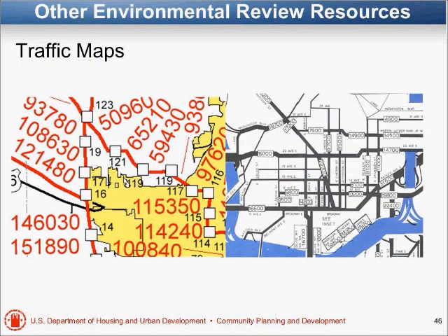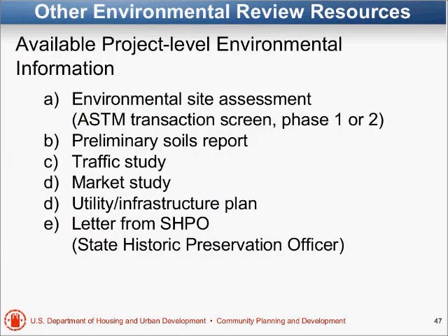Traffic maps. Remember I mentioned noise, and I said that if you have a street where there are traffic counts, and it's near your project within that 1,000 feet unobstructed, then you should do a noise analysis. Here's what these traffic maps may look like.